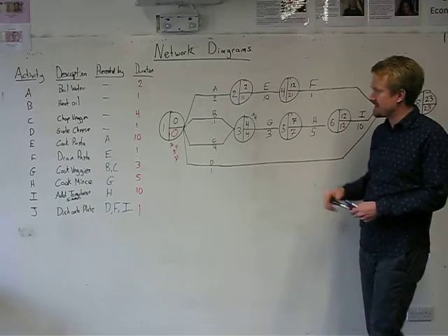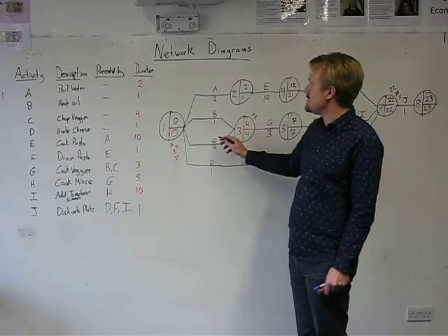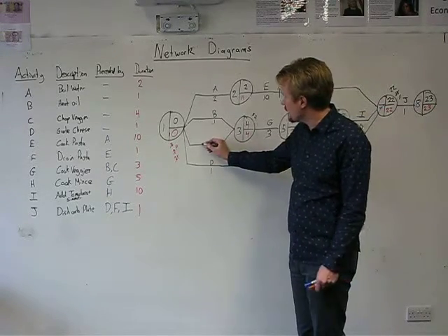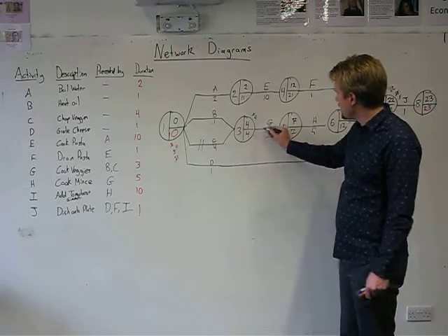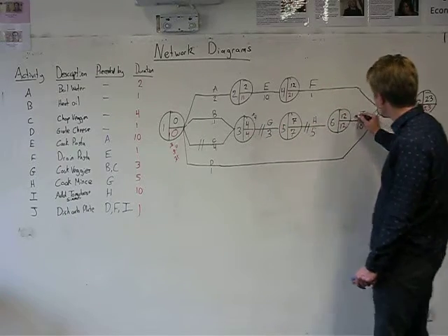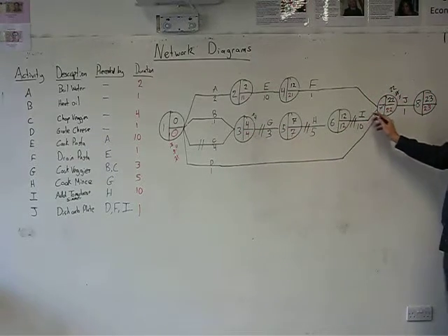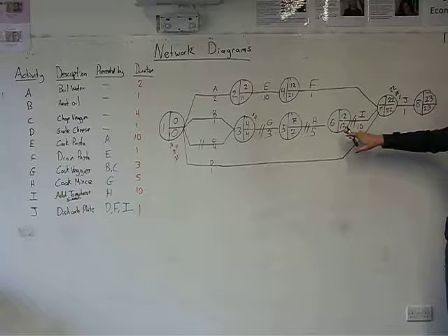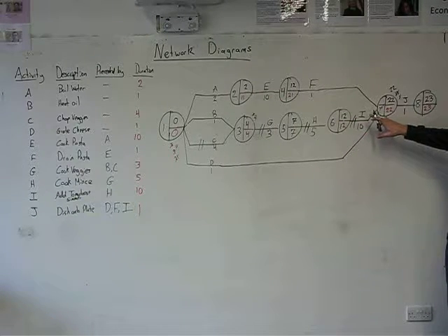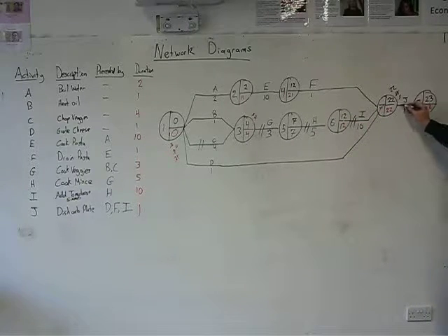So the critical path is actually that longest path in between, which says, okay, between C and B, chopping the veggies takes longer, so I'll show the critical path by putting a little hash mark in there. It'll then be this line through here. So the critical path will go C, G, H, and I, because we can only start task I after 12 minutes, and it'll take us 10 minutes to do. So by the time that we get to node 7, we don't really have any slack on this path, and therefore J, because it's the last task, will also be on the critical path.